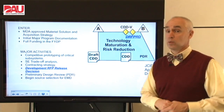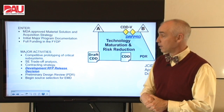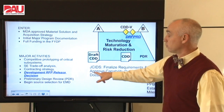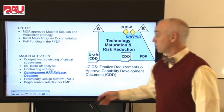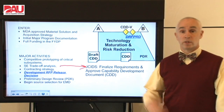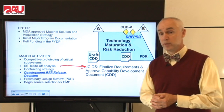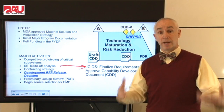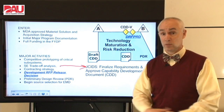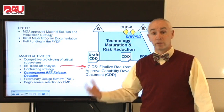In order to get to the point where we are comfortable with our technology, you're doing competitive prototyping if it makes sense finance-wise, and we're also doing serious systems engineering trade-off analysis — cost-performance trades — and that informs our JCIDS process. We need to tell our users what's affordable so that when we get those capabilities written down and approved in the CDD, or Capability Development Document, it's something we can actually afford within the context of the Department of Defense. It also has to be technically feasible, which means looking at how things are going in terms of maturing the technology.